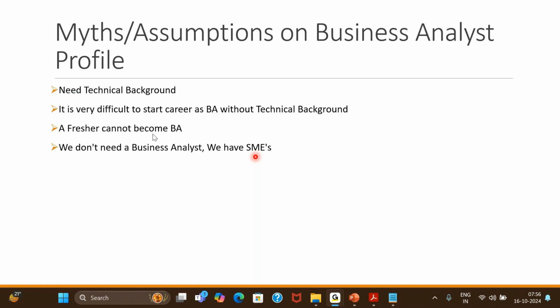If I have 5 QA and 5 developers, that already exceeds the Scrum team size, so maybe I want to divide the team. But the general rule of thumb we follow is that for every 4 to 5 development team members, there should be one BA. When I say development team members, that includes both developers and QA.